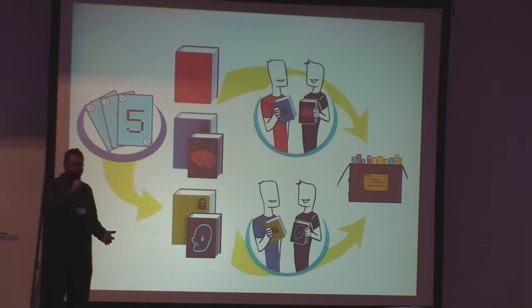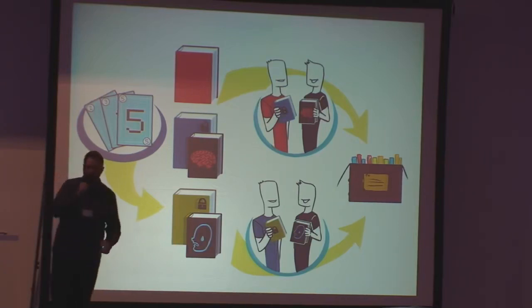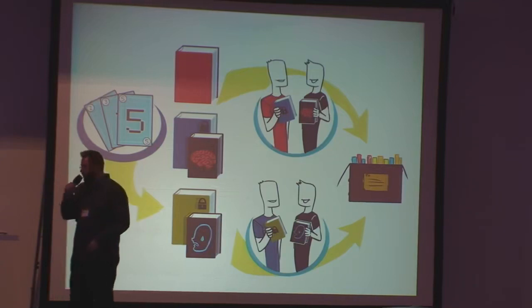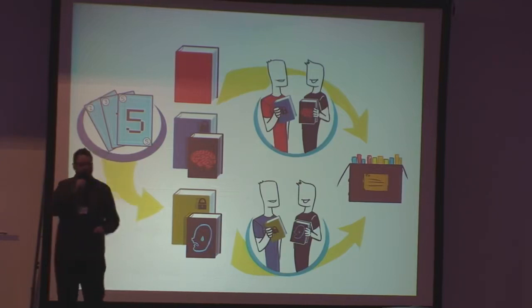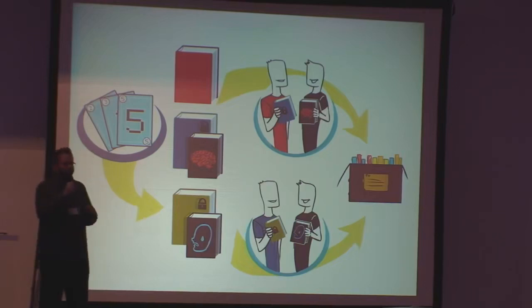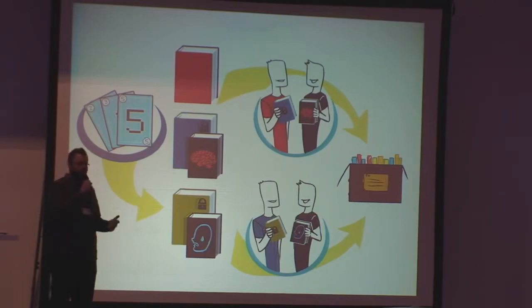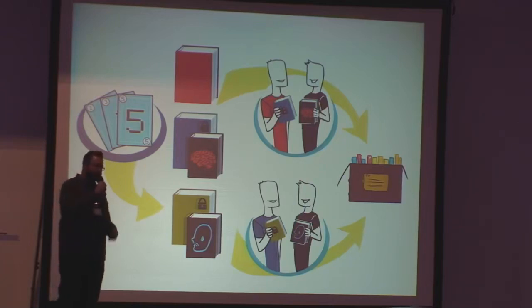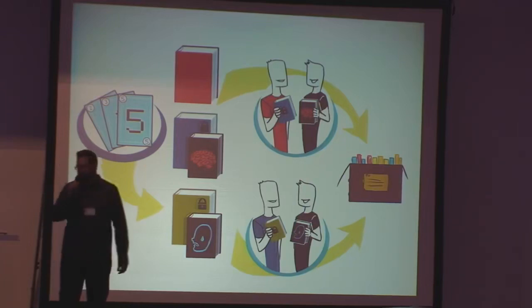And the security engineers were now independently operating, working with the relevant representatives of the development team to make sure that this story is completed, including the security review. And the goal here was to complete that security task and find possible issues as well as fix those issues during the sprint. So that's the goal, is to complete this when the development team is focused on it, not after the fact when they're trying to do something else. Let's try to find it early and fix it early.